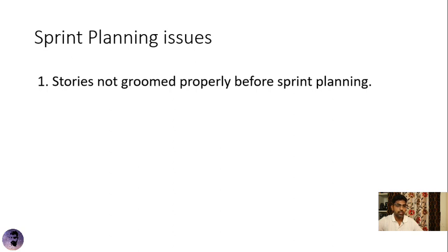This usually ends up in an overestimate, like 20 story points or something like that, because of a lot of uncertainties, or it might end up in an underestimate, wherein the team member will be cornered in the end, asked for the wrong estimates. These are some of the things that we have to avoid by grooming the stories at least close to 90%. A story is not a requirement. It is elaborated in time, but a sufficient amount of acceptance criteria has to be provided, so that the team can give a good estimate, I would say.